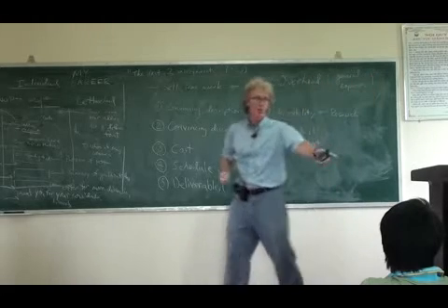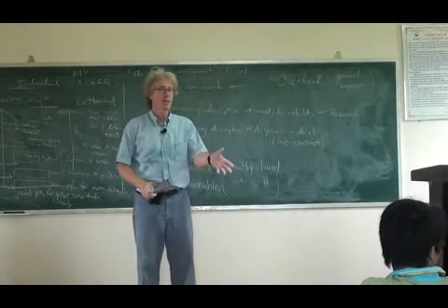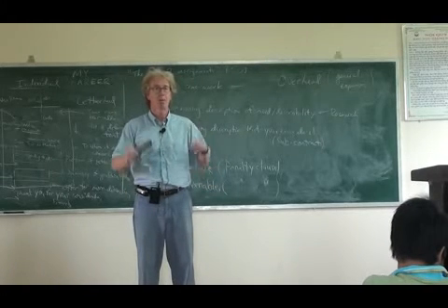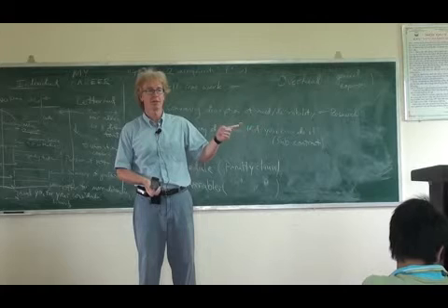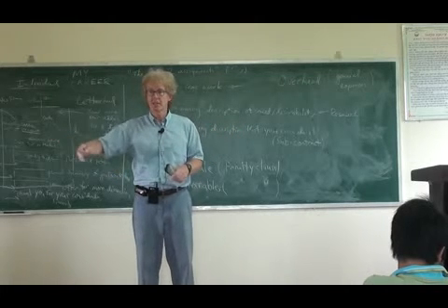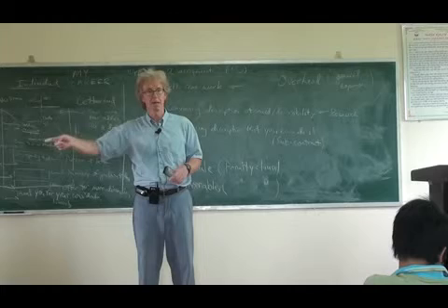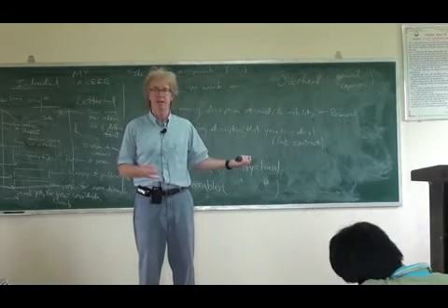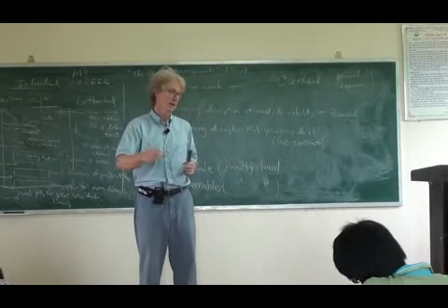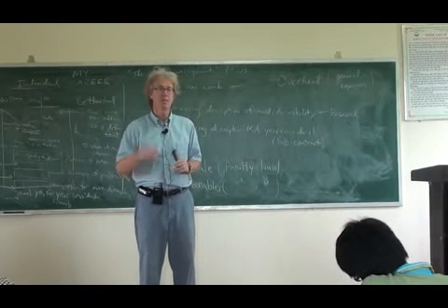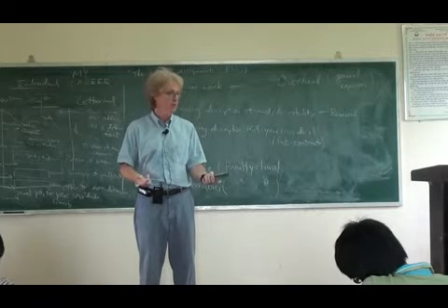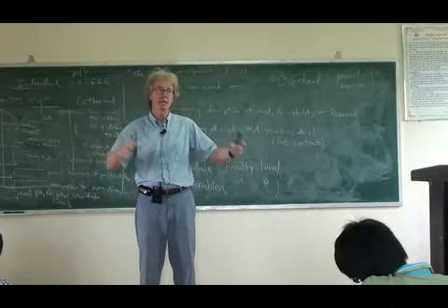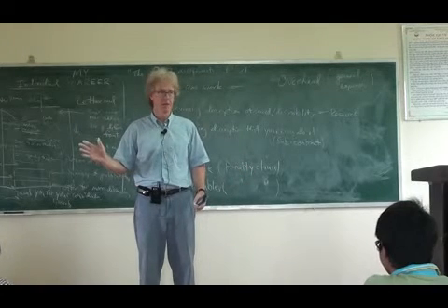So I was just using the example that this group of 5 people from Dynamics, when they graduate, they decide they're going to make their own company. So part of their company is to go rent an office in downtown Tai Nguyen, and they have to hire somebody to be the secretary, to take the mail, send the mail out. They have to hire a couple of computers. Right? An engineering company has to have computers. You have to pay for an internet connection. You have to be part of the web. You need to maintain a website. Maybe you hire a professional to maintain the website. So all of those kinds of expenses are part of being a company, no matter what work you're doing.